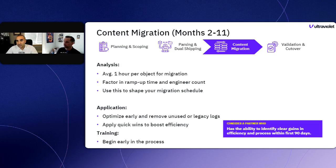However, working in conjunction, it just really accelerated our process, and it taught us also to ask better questions, because now we understand the context of why those queries were even built to begin with. So another lesson learned along the way is to embed training throughout the deployment. That way you get more input from the actual stakeholders that are using the system versus all at the end.